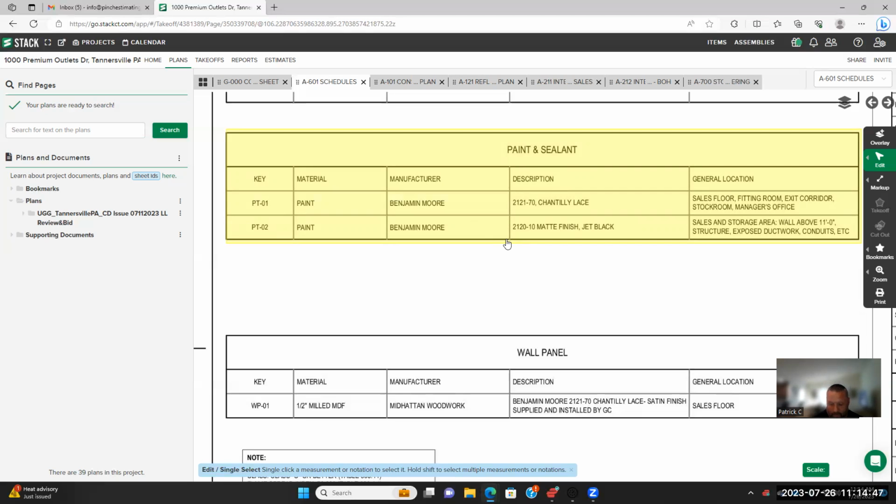And one of the things I would put in here, and I always put on my bid proposals, is paint will proceed prior to the install of finish items not needed for a watertight fit, meaning don't put the grills on before we paint the inside of that grill black, right?